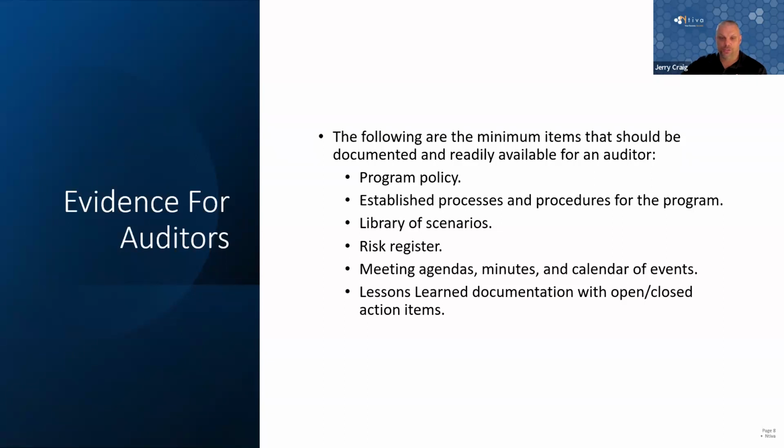You need a risk register. That's where we're recording all of the risks that we find in these tabletops, what we're doing, who owns them, when we're checking back. This shows the auditors that not only did you discover problems, but that you're actively doing something. In a lot of the compliance frameworks, there's an expectation that you mature and improve over time. So if you have a risk register and every time you meet, you add items to it and you never complete any of them, you're going to show an auditor that you're not actually maturing. So yes, you're going through the motions, you get to check that box, but then you'll either be scored negatively or you may not pass if there's no maturity.